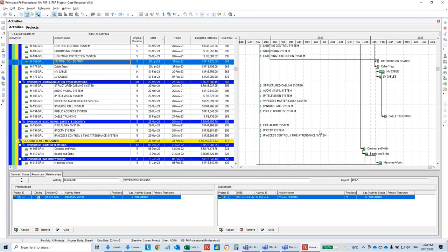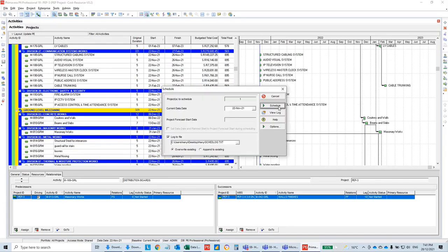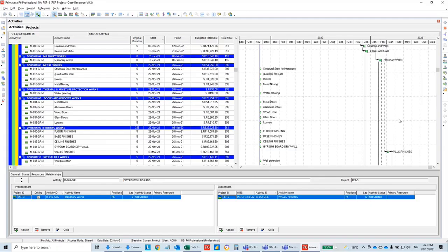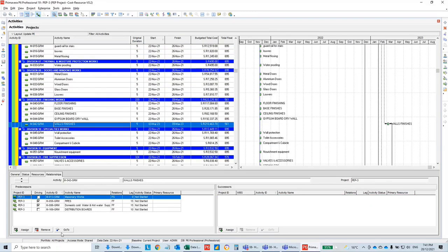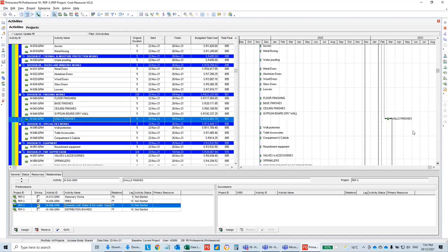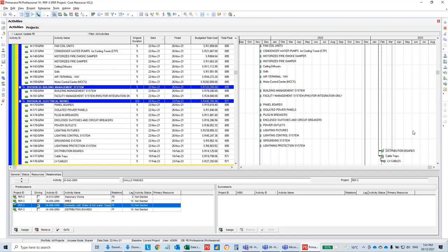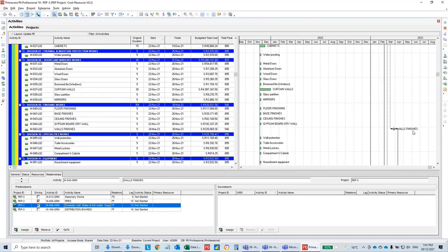Okay, let me schedule now. As we can see here, wall finishes, all of this one before the wall finishes. Masonry, finish to start, pipes, finish to finish was like 15, domestic, finish to finish 15, and all our activities look fine and very good. And this was implemented to all floors, one shot for all floors.